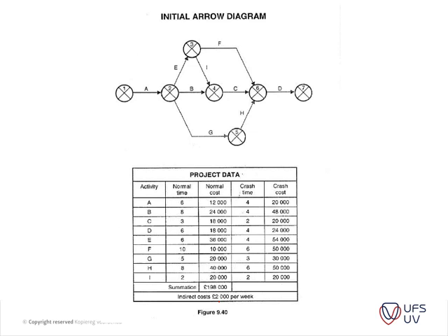And then on page 119, you will see this diagram. In figure 9.41, the analyzed diagram based on the normal time situation, which gives an overall project duration of 28 weeks. Okay, so basically what they did is they just plotted the normal times to see what the actual normal time of this project is, because you can't just add all of your days together, because they have